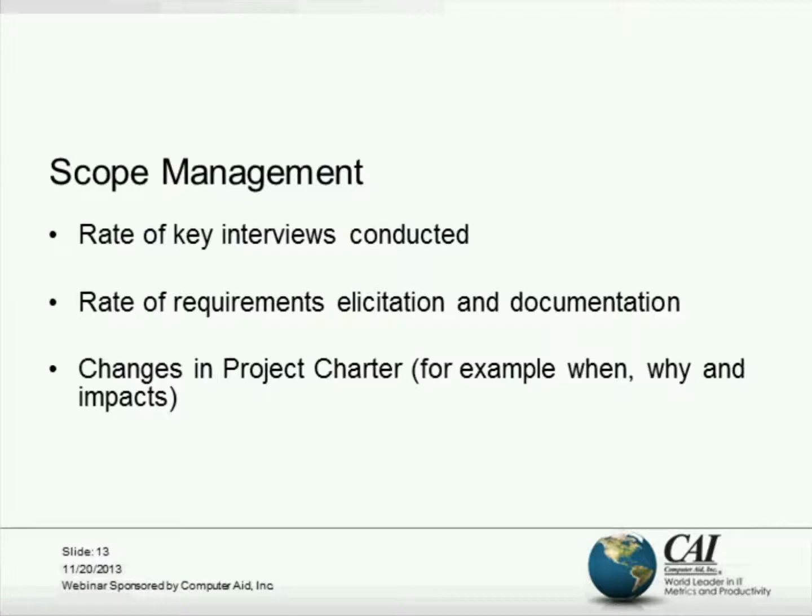According to IEEE Standard 830, 1998 — the recommended practice for software requirement specification — the characteristics of good requirements are: correct, unambiguous, complete, consistent, ranked for importance, verifiable, modifiable, and traceable. These requirement attributes begin to set the measurable items for the project scope.